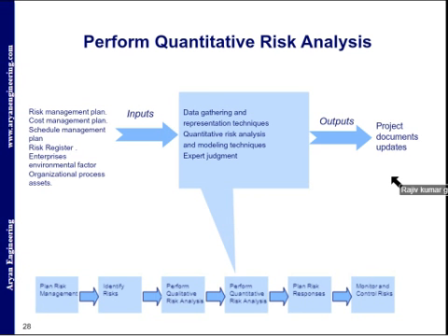The rating of each risk is based on the attempt to measure the actual probability or amount at stake or impact. Therefore, while the rating for the risk in qualitative risk analysis might be 5, it might be stated as a $4,000 added cost impact in the quantitative risk analysis. The output of this process is also project document updates.